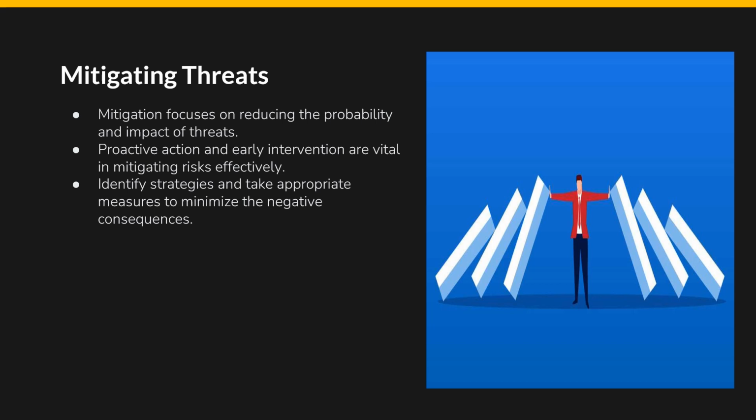Supplier reliability. A manufacturing project identifies the risk of unreliable suppliers causing delays in the supply chain. To mitigate this risk, the project manager implements a dual sourcing strategy, where critical components are sourced from two different suppliers. This approach helps reduce the dependency on a single supplier and minimizes the impact of potential disruptions from one supplier. Scope creep in project management.